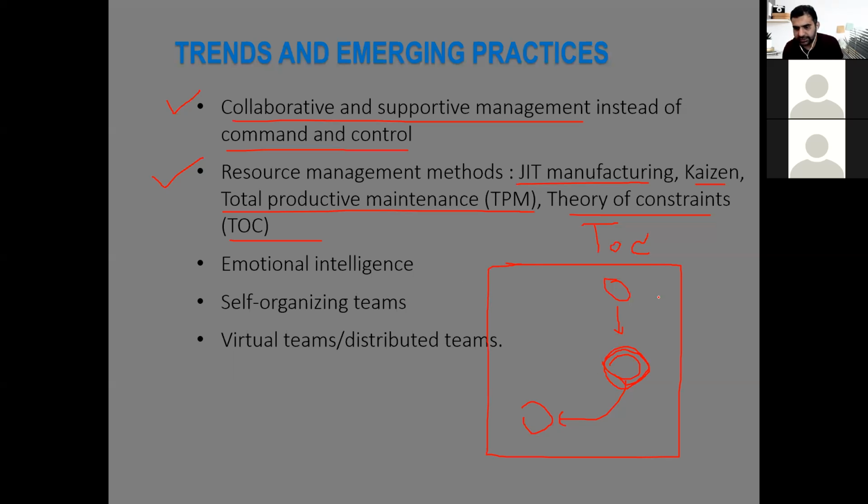For example, if this is a system, a workflow where work is flowing through different components of the system, and we say that this is a bottleneck. Now, theory of constraints says that if this component is a bottleneck, then we need to look at its interfaces, both incoming and outgoing, and isolate this particular bottleneck. Once it is isolated, we see how much work is on this bottleneck.